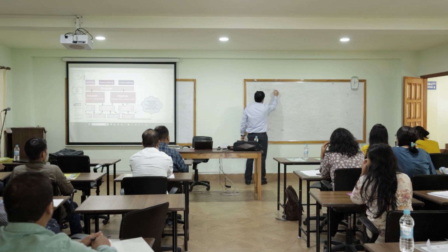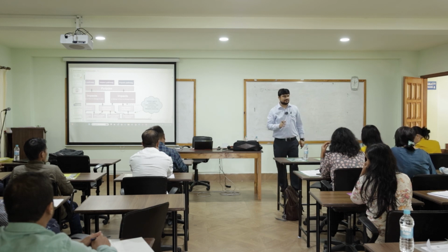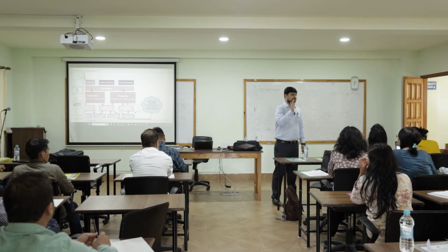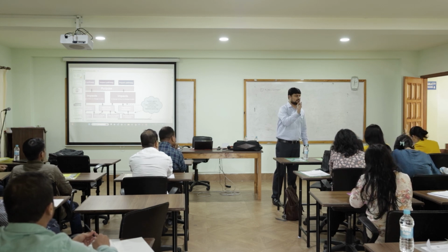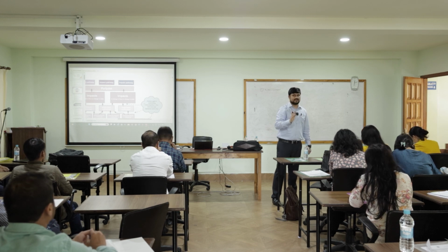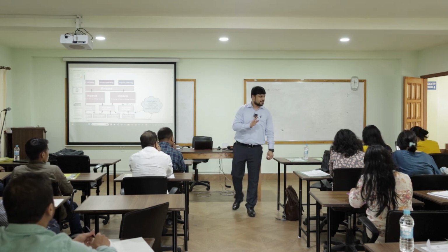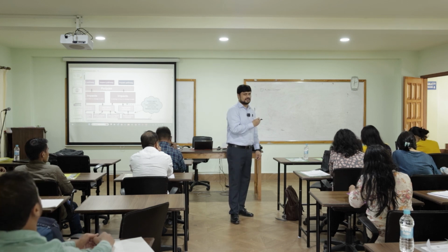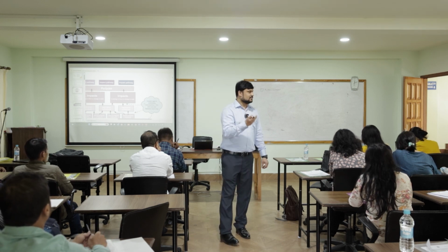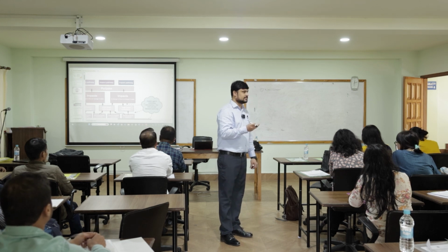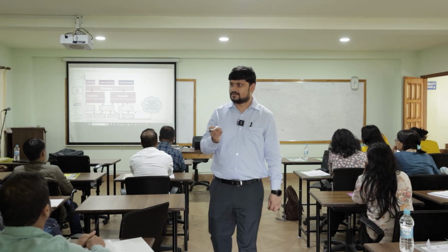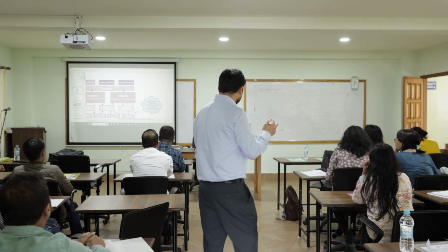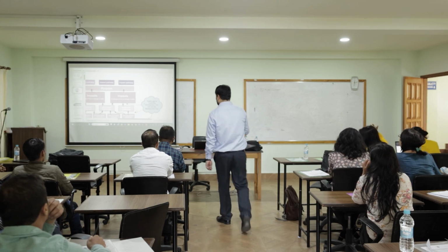It is non-linear. By linear I mean, it is not as if one activity will translate into only one output and one output will translate into one outcome only and one outcome will move into one impact level indicator. It is never that linear. There is a good possibility, like we saw in our example, counseling was also contributing to household resilience. Right? There were door-to-door visits that were also contributing to the resilience of the households. So it is not going to be one thing mapped with one thing only.